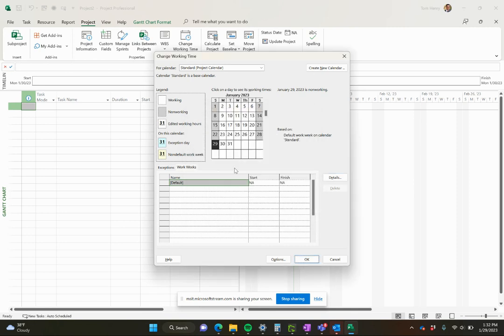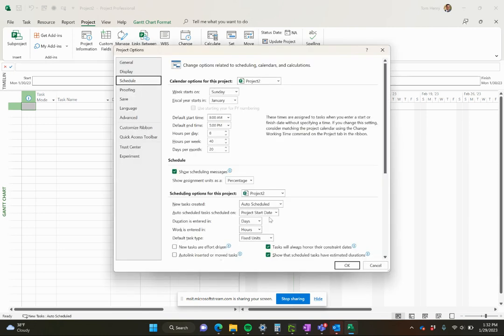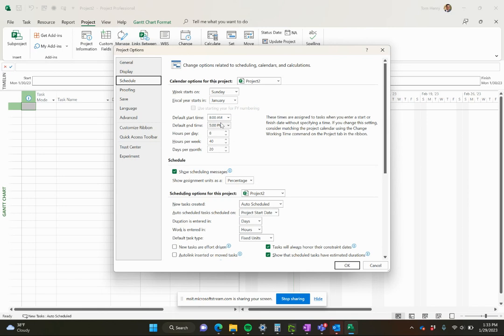However, if you do make any changes to that, you are going to want to click options down here and come into the project options area and make sure that the hours per day, week and month are synchronized and the start and finish times are synchronized with your calendar. That's because when Microsoft Project calculates tasks, it's going to use both. So if you put in one day for a task, it's going to use this hours per day. Now, if your day is actually seven hours and the default is eight, it's going to be sticking with the eight. So you're going to have a mismatch. Definitely come in here. I hope it saves you some trouble there.